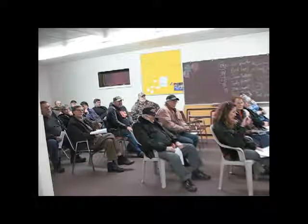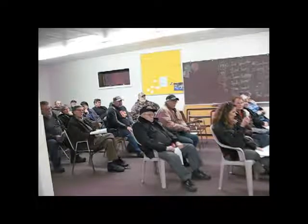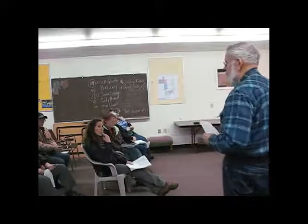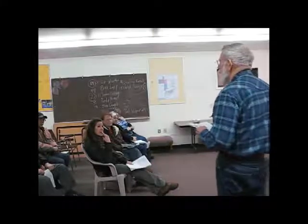And by the way, who makes the final call on that CIP list? Actually, it's jointly done. The road superintendent and the three of us. We do a drive around in the spring, look at everything that's out there, and that's one of the ways we pick up additional roads or say, we're going to change the priority. And I'm not stuck with, well, my road's been on the list for the last 5 years, how come it's not at the top? We don't do it that way. I want it done on physical condition.